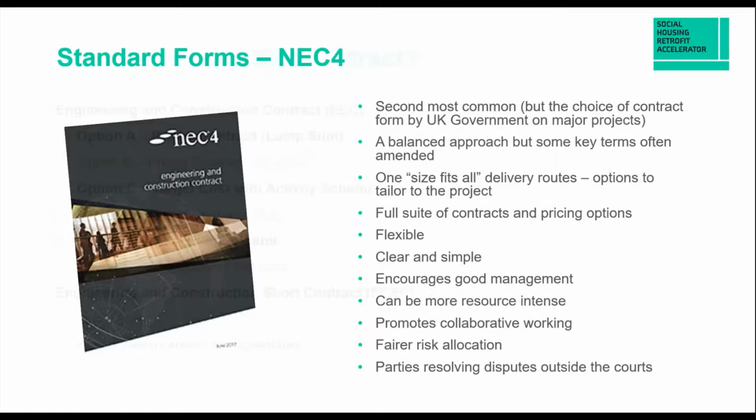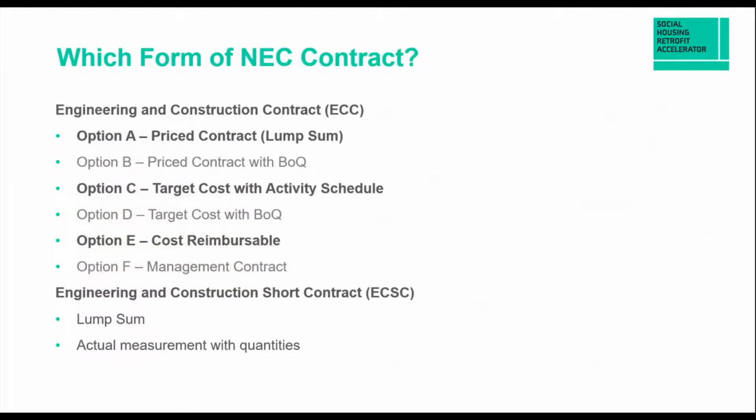So moving on to the next slide then, which form of NEC contract? As we noted earlier, NEC isn't aligned with those specific delivery routes. So whether you're looking for the contractor to undertake any design or not, the ECC contract would be the one that you use. And you can see there's a full form and there's also a short form. The full form is used for more complex, potentially higher value projects, and the other for more simple projects that perhaps don't need as many sophisticated management techniques.